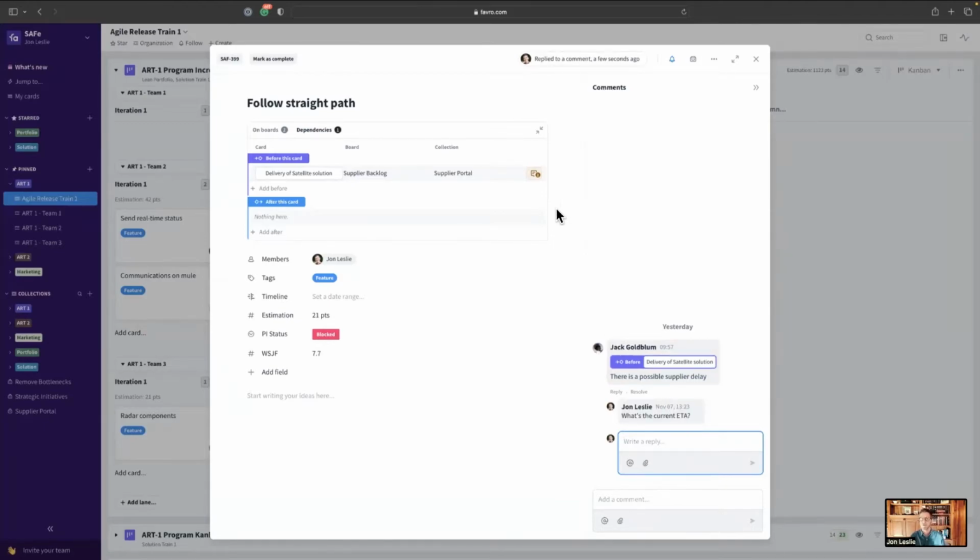Like this. So each and every dependency on the card is going to have its own conversation thread to resolve that dependency ad hoc. Again, of course, that's much better than Gantt style dependencies where you have this spaghetti of hard dependencies. Here, people in interactions over processes and tools have the conversation, right? Even across with your external vendors to resolve those dependencies on the cards themselves, like you see here.